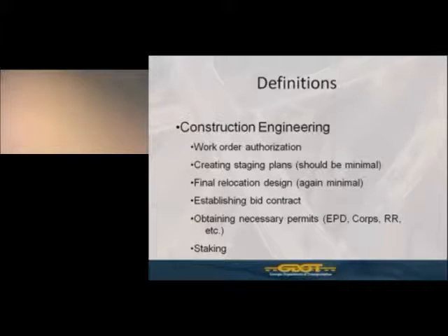Construction engineering would be items that would occur when you're authorized to start work on a work order. If you need to develop staging plans or utility sequence operations, or completing your final relocation design. Now, we say both of these should be minimal, and that's for a reason.